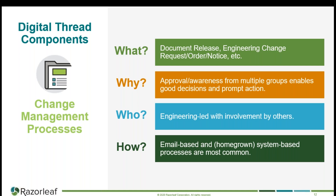Another important activity is change management. Document release processes, engineering change requests, ECO, ECN — these are critical because multiple disciplines in the company must review and approve changes to a product, since they all contributed when the product was originally defined. Engineering typically leads these processes, which is why they're called engineering change requests. These are done in various ways — lots of companies use email, and plenty have homegrown systems based on Access or similar tools — because there's typically a high volume of changes happening to products over time.